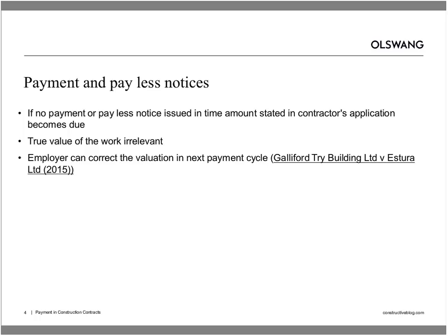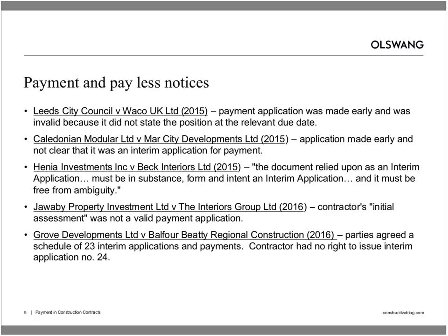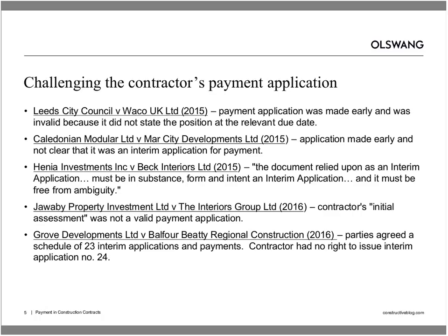If so much turns upon the employer serving a notice against the contractor's application, what prevents the contractor from issuing a fresh application every few days? Well, payment applications must be issued strictly in accordance with the building contract, and the courts have shown in many cases over the last year and a half or two years that they are willing to scrutinise contractors' payment applications.